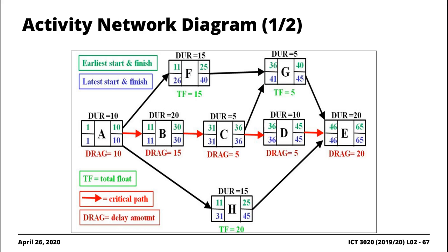The activity network diagram is a useful graphic used to represent the project schedule. It is typically used to determine the critical path associated with the project, compute the total duration of the project, and more importantly, the different slack values associated with the various activities or tasks. Sometimes the slack is referred to as float or total float, so TF here would be the slack value.